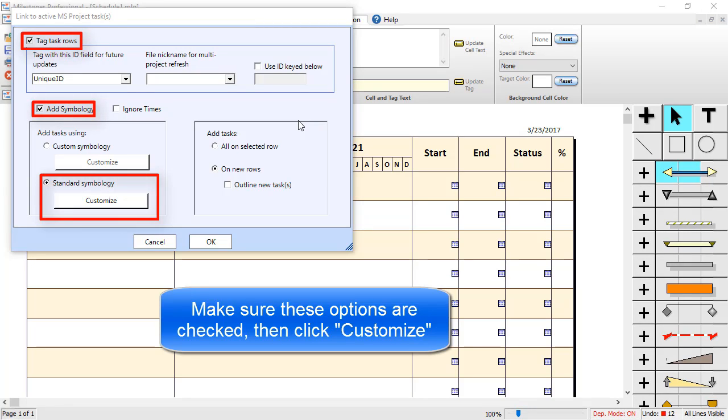Make sure Tag TaskRows is checked. And since we are going to add symbology, make sure Add Symbology is also checked. Choose the Standard Symbology option and then click on Customize.